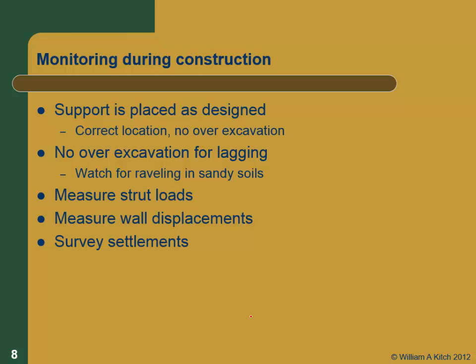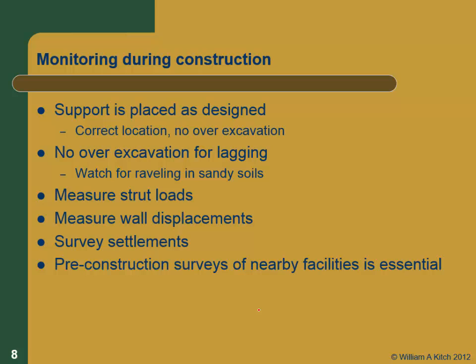And then outside your excavation, you need to have survey points for settlement, because even if your excavation never moved and there were no displacements, which isn't going to happen, somebody's still going to sue you for damaging their structure. I know that because my most lucrative jobs before I started teaching was doing this last bullet, which is doing pre-construction surveys of the nearby facilities.